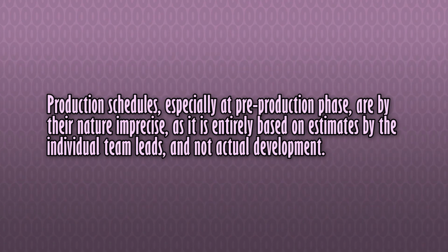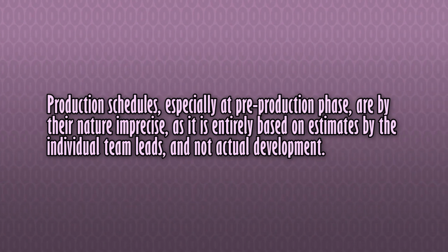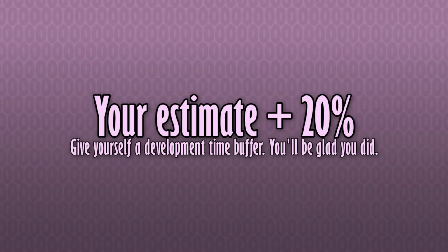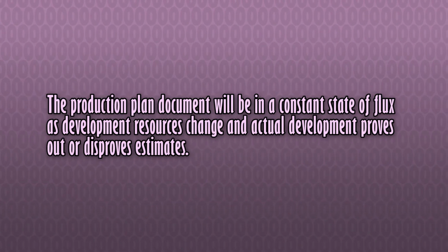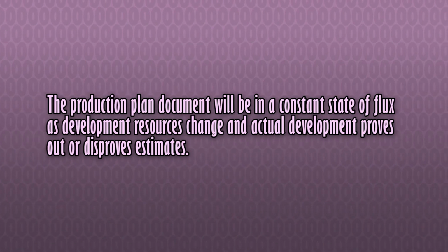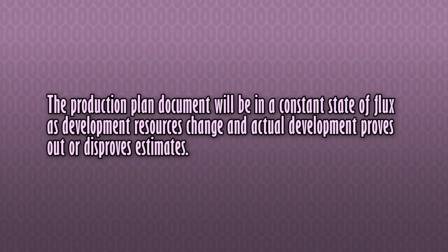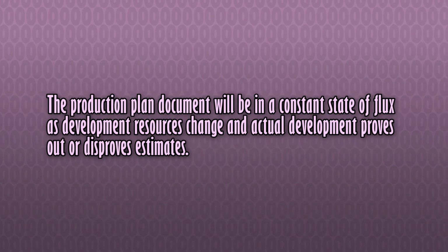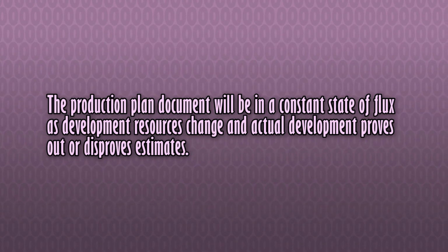Ultimately, the savvy producer will know their team well enough and create buffers for development time. I always worked from the perhaps pessimistic credo of take whatever you think it will take and add 20%. This is going to be a living document, of course, and in practice, many development environments won't adhere to this schedule, as odd as that may sound. The agile methodology, to which so many studios ascribe, preaches frequent iteration and reiteration, so that also should be factored in, and some concessions made to the chance of features changing, getting scrapped, or completely rewritten, as we work on finding the fun, as they say.